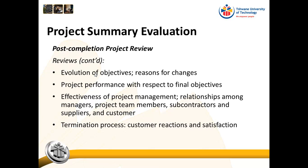You also have to look at the termination process: is the customer satisfied? If not, you have to take steps — sometimes including starting a new project to ensure customer satisfaction. If the customer was very satisfied, you also need to document that so that future project managers can learn how you managed to satisfy the customer so well.